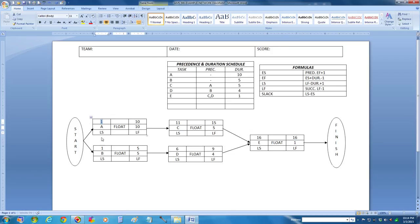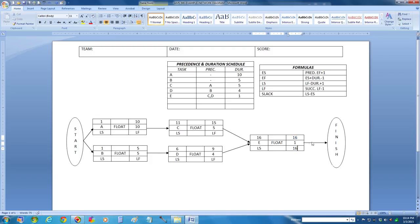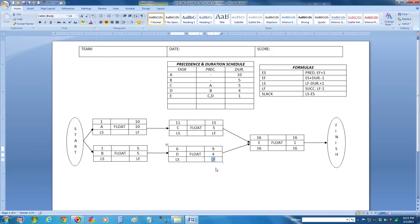Just like we started at day 1 on our first activity's node, we're going to use its earliest finish time as its latest finish time as well, which is 16. That will ensure that the project has no delays. Now we're going to work backward and use a different formula. To calculate latest start time: latest finish time minus the duration plus 1. So I've got 16, minus 1, plus 1, is 16. That 16 is then used — the earliest start time of a successor — to find the latest finish time of its predecessor.